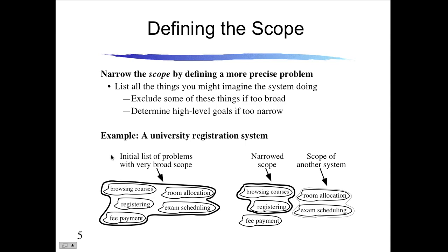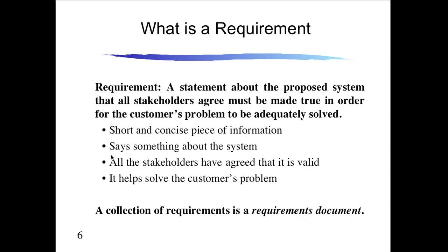They actually call that, in terms of the development process, function decomposition or functional decomposition, because you're decomposing the system into different functionalities. And you can start out right there with the scope and functionally decompose it and break it out. Makes it more manageable. The theory is it's easier to solve the smaller problems than if you concentrate on the big picture. You can't see all the smaller details when you're looking at the big picture, which is why your scope's important.